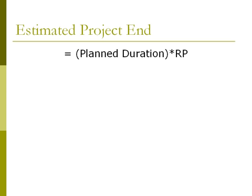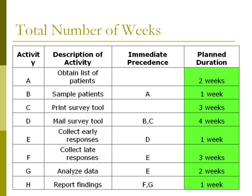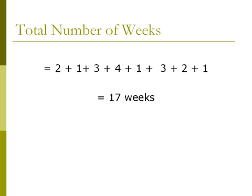Another piece of information useful for the project manager is to estimate the project end. This is found by multiplying the planned duration by the rate of performance. We just determined that the rate of performance is two, so we now must find the planned duration of the project. The planned duration is found by taking the total number of weeks of the project and subtracting the total number of weeks not on the critical path. The total number of planned weeks is the sum of the weeks listed in the column highlighted in green, which is 17 weeks.